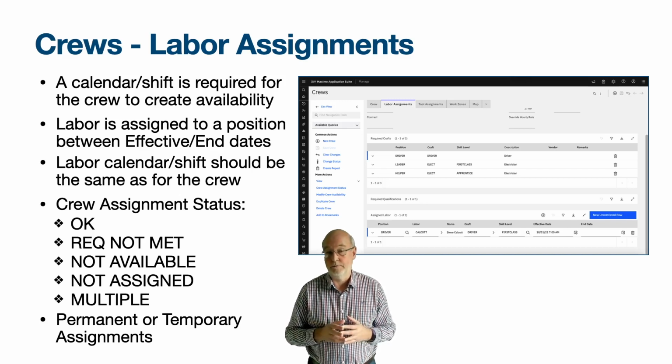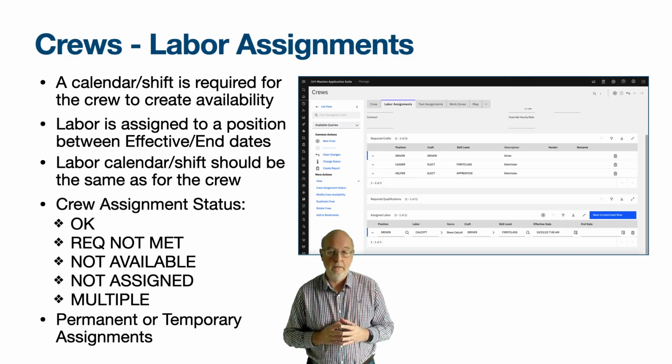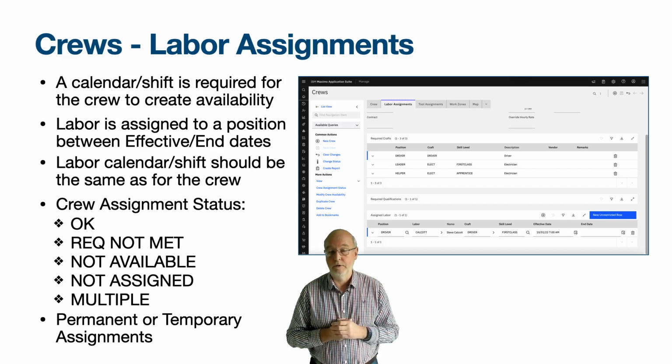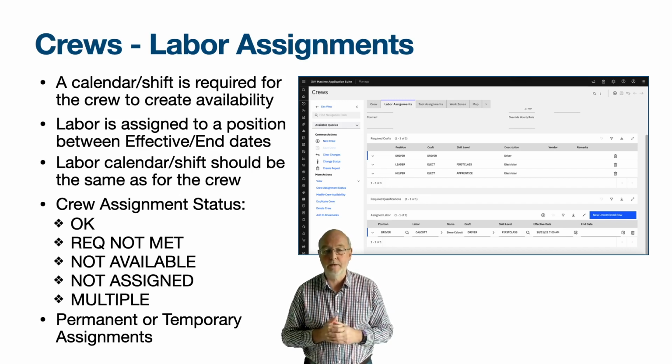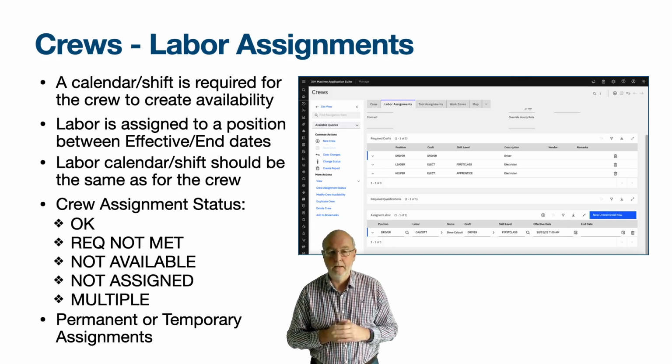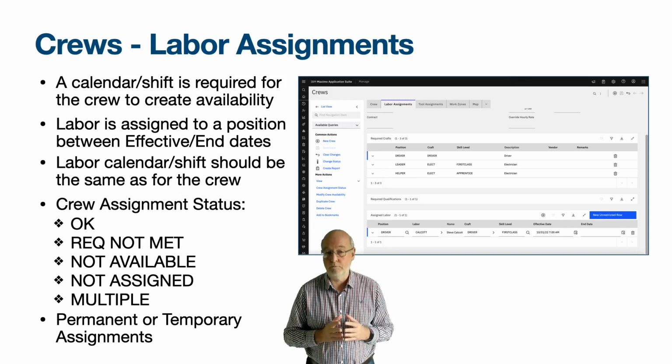One of the features of the new unrestricted row occurs if a labour is already assigned to a different crew. Then it will remove them from that crew for the specified period and return them to the crew if the original assignment is no longer than the new one. It is useful for making these temporary assignments. Other benefits of the new unrestricted row action are that it can create an additional crew position and labour assignment in one action, or add a craft that has not been crew enabled.